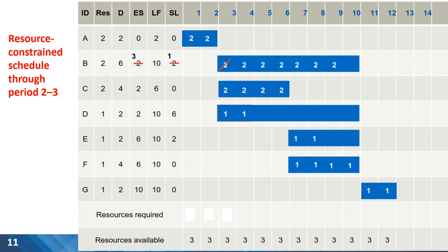For the first two periods of time, we don't have any problem because the only activity being completed is activity A with two resources required. In the third period of time, however, the sum of required resources is five, and we should decide which activity to move. Activity B and D have slacks; however, because the maximum available number of resources is three, moving activity D doesn't help. So the only option following the priority rule is moving activity B. For the third period, the slack is reduced from two days to one because the early start date is delayed, and now we start activity B at day three, solving the resource leveling problem in the third period.